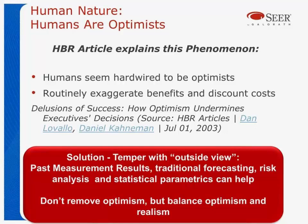There's an article in the Harvard Business Review that discusses some of these issues, going back to the Nobel Prize-winning research of Kahneman and others. What they found was that humans are hardwired to be optimists — no matter what. Most of us are hardwired to be optimists. They hypothesize that perhaps back in the old days, if you tried to kill your food and you missed, you had to go on and do it again. People routinely exaggerate the benefits and discount the costs. This causes problems both on the estimating side and the business case side, where often the costs are underestimated and the return on investment is well overestimated. The solution suggested is to temper by an outside view — provide some kind of past measurement results, forecasting, risk analysis, or statistical parametrics.